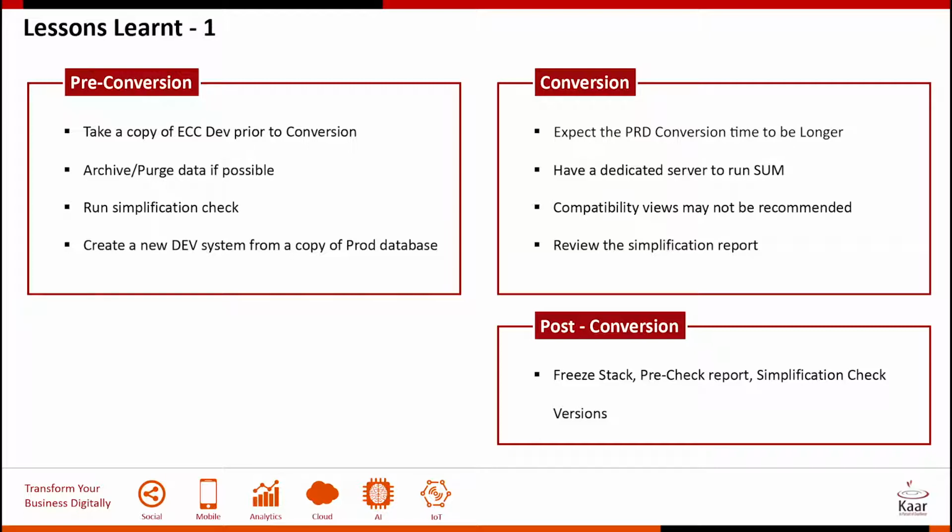On the conversion, you might have run multiple mock conversions, but that does not mean your production conversion downtime would take exactly the same time as it did for a mock, because you should remember that you might have done your mock maybe 3 to 4 weeks ahead of running your production, and then more transaction data has gone in. So please estimate that and be aware that it could take a little longer than what happens in your mock. And when you run the SUM tool, the more power you give to the SUM tool, the more it helps, because you're able to run parallel processing. And then reviewing the simplification report.